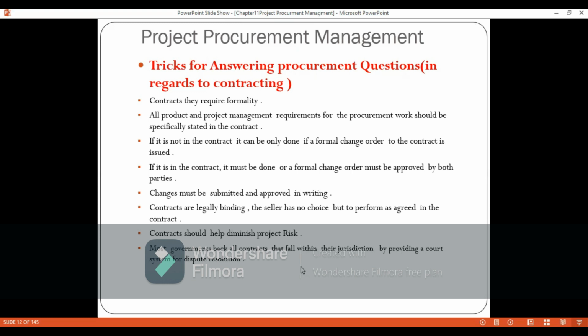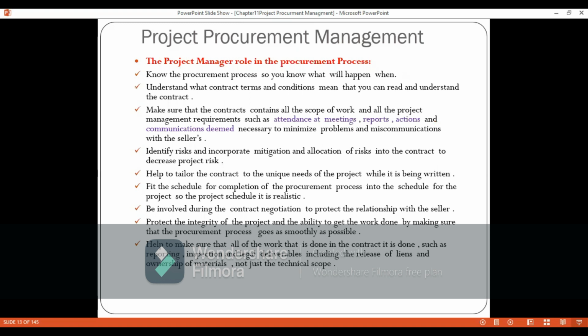So we might have a conflict between the two parties, the buyer and the seller. The contract might state in one of its special provisions that in case of a disagreement, we are going to get a mediator, or an arbitrator, a third party who tries to solve the problem between both sides. If that fails, then we can go to court to resolve the dispute.